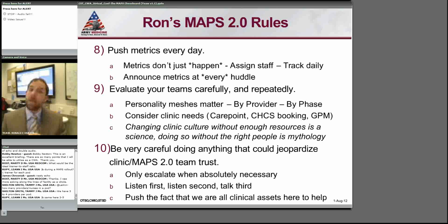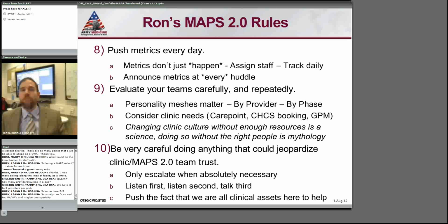And I announce at every afternoon huddle, guys, you saw 42 patients today. Right now, you've got 15 open appointments, but keep in mind it's not the end of the day. Just want to see where we are. I'm not concerned about the 15 open appointments, but I just want to see what that says about our process. My goal as we move through this is eventually out of 42, you might have 8 open. All I'm concerned about is the trend. And I specifically do it at 4 o'clock because that's when the huddle is, even though I know many of the providers won't be done until 4:30. I don't want 0. I just want a positive trend. And you saw that. We didn't get down to 0, but we got moving in the right direction.